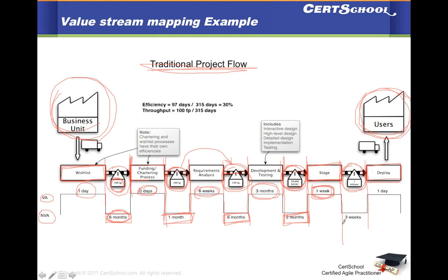Whatever time lapses in between is again a non-value add. In this example, it is 3 weeks. You have the code bundle, but you don't have the production environment ready or set up. Then you spend about a day setting up, once you have identified all the resources, right people, skills. That is value add time. And now it is ready to be consumed by the users.